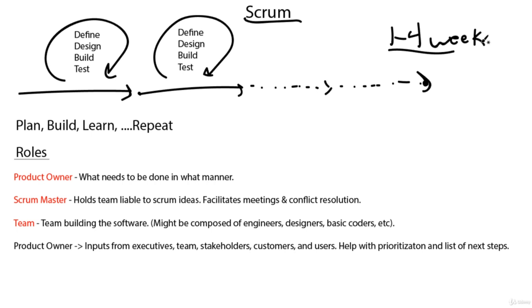It's a Scrum sprint. And the sprint is this idea of quick development, adding in the highest priority features, then going to the client, the stakeholders, everyone who's involved, showing it off to them, taking feedback, and redoing the cycle. It's this idea of plan, build, learn, repeat. So we're going to do all of our define, design, build, and testing within this sort of Scrum sprint here.